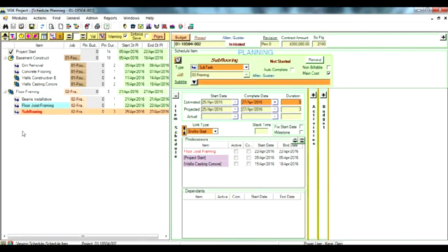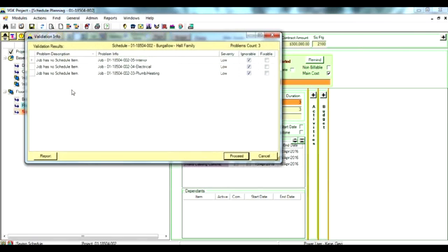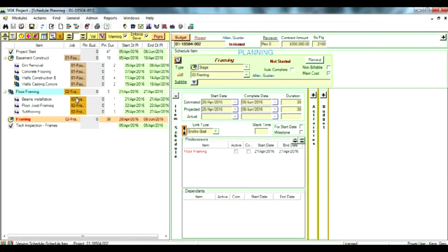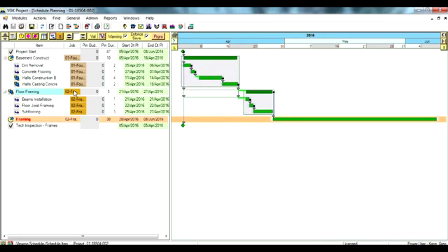So now we've developed this section of the schedule, we can proceed to save it. When we go to save, the VGK project validates all the information and it reports on any identified problems. All the problems here are specified as a low severity, so they can be ignored and resolved later. So we'll go ahead and save. You can also visualize the schedule by using a Gantt chart.